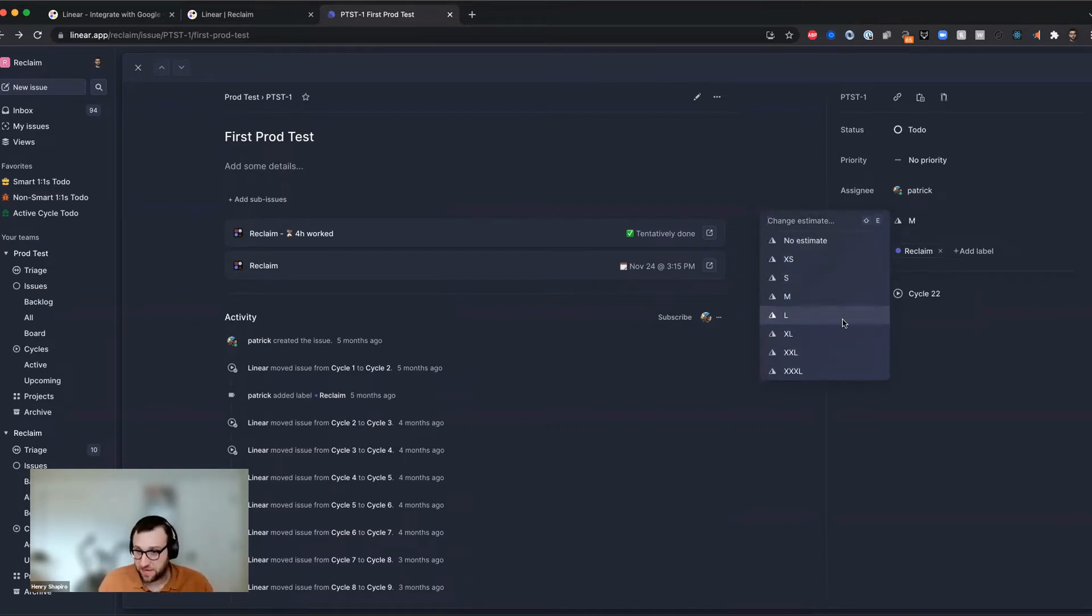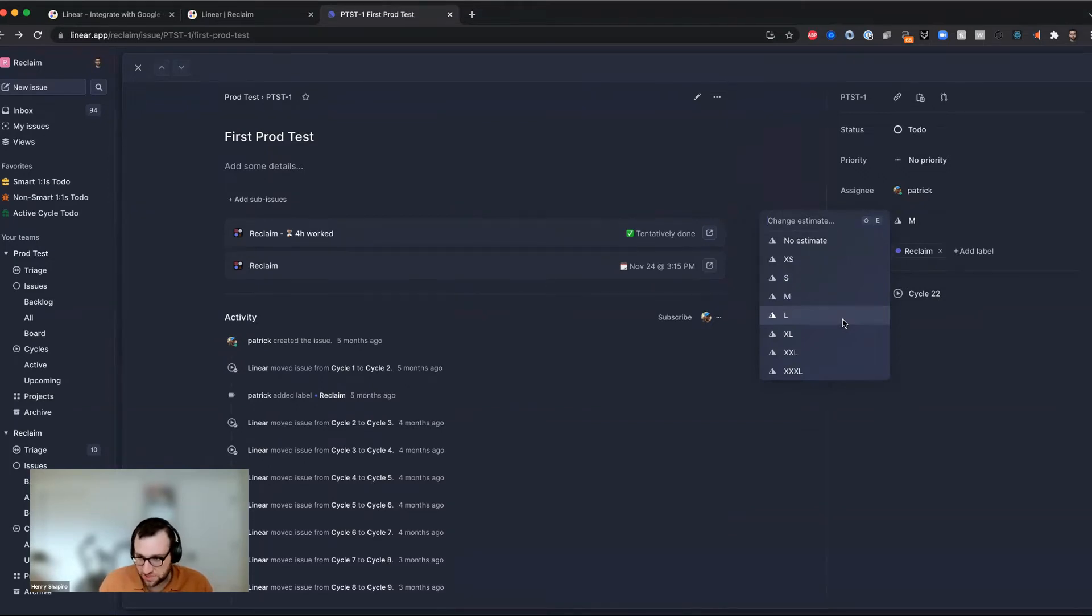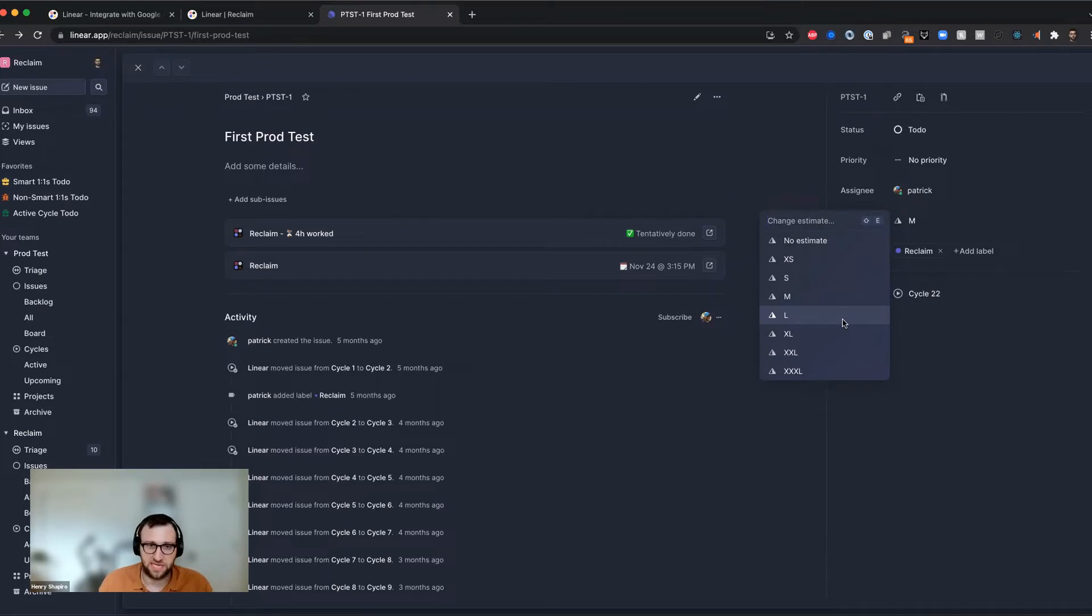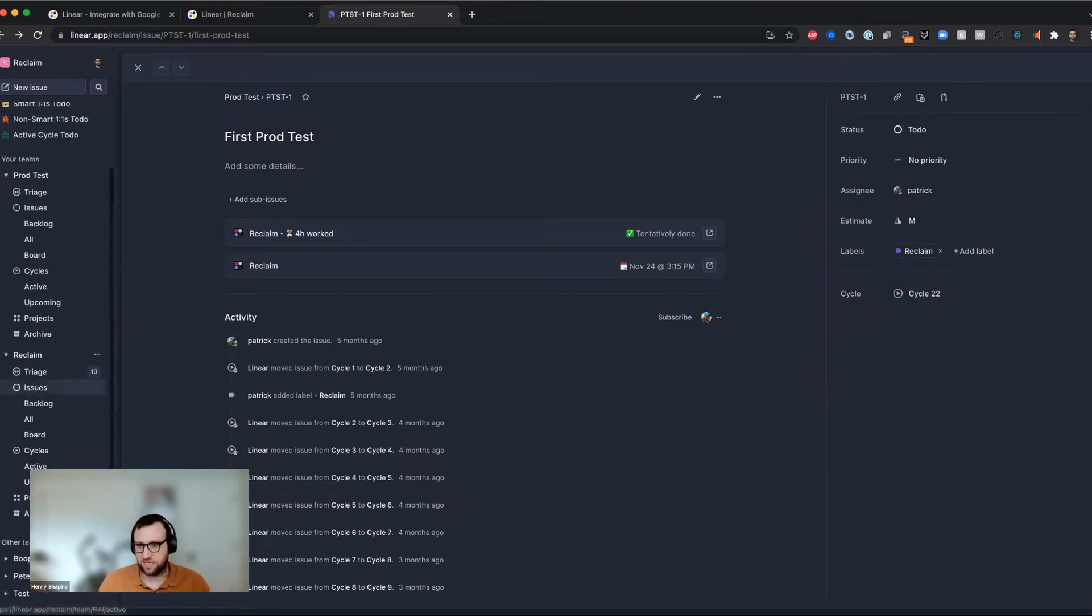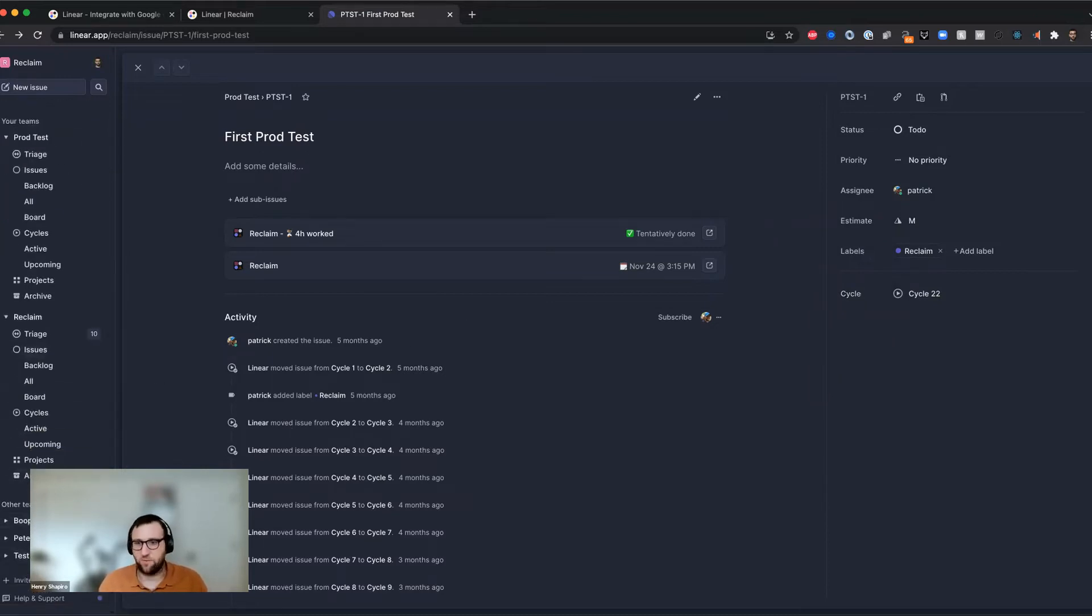And then of course, I need an estimate, which in our case, we use t-shirt sizing, but you can use any of the estimate types that are offered in linear to add an estimate to the issue. And that's what's going to ultimately correspond to a duration in our system. And that's what's going to tell us how much time we need to block.